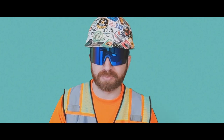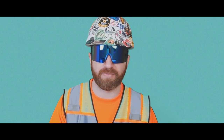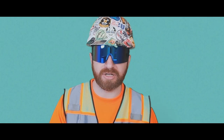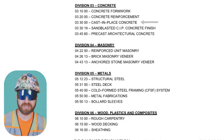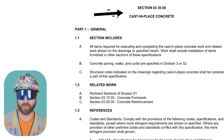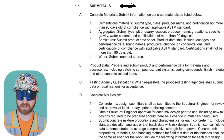Read your specification section first and understand all the requirements. There's usually some sort of software to transfer submittals back and forth between the contractor, other contractors, and the architect and engineer. Using the mix design submittal example, I'm going to navigate to the cast-in-place concrete spec section in the spec book.